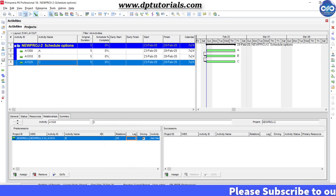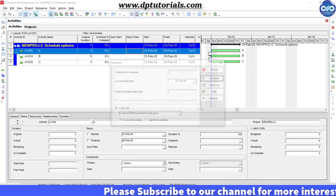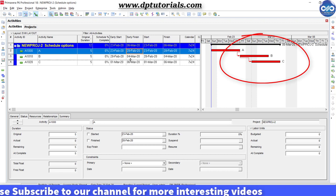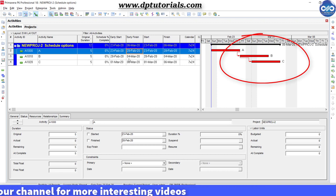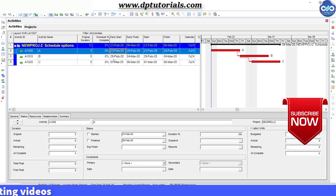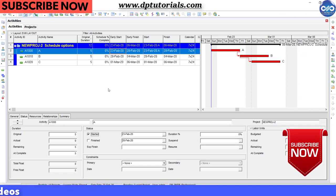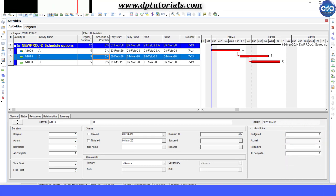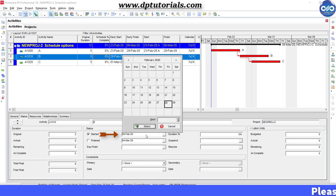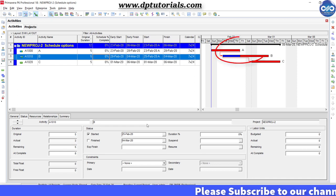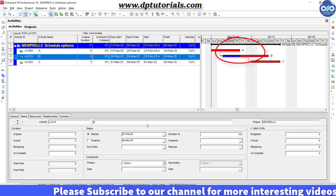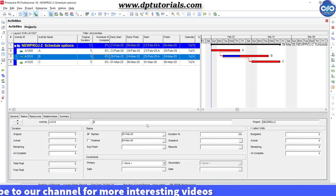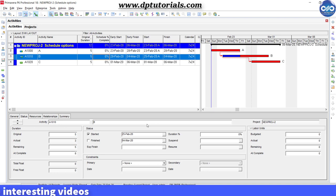Now let us update the schedule as per the actual updates and consider 26th February as the data date. Put the actual start date for activity A as 23rd February 2020 and put the actual start date of activity B as 25th February. That means it is running actually out of sequence because activity B should be starting only after the finish of activity A, but here it is starting before the finish of activity A.